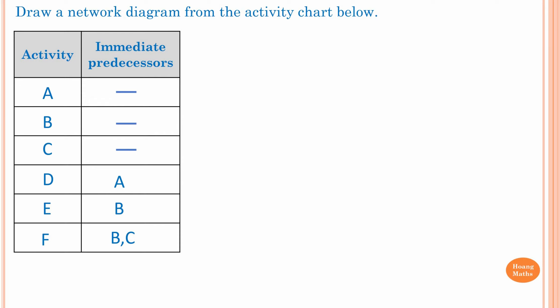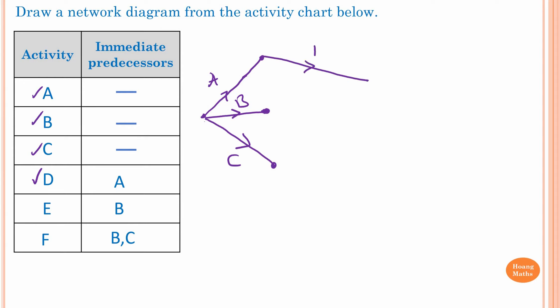Next example. We can see Activity A, B, and C have no prerequisites or immediate predecessors. So I draw these first — Activity A, Activity B, and Activity C. Activity D has an immediate predecessor of A, meaning we need to complete Activity A before moving on to D. So starting from A, I draw out Activity D.